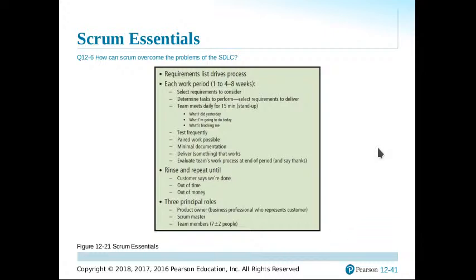So we just remember that with Scrum, we are not doing phase by phase like with the software development life cycle, but at different scale. That means for the first phase, you have the job done by 10%, and it goes to the next one. It's not waiting for the first phase to be done 100%, because that takes time. So with Scrum, we choose to do the very first step, having the job done 10%, which is good enough to proceed to the next step.